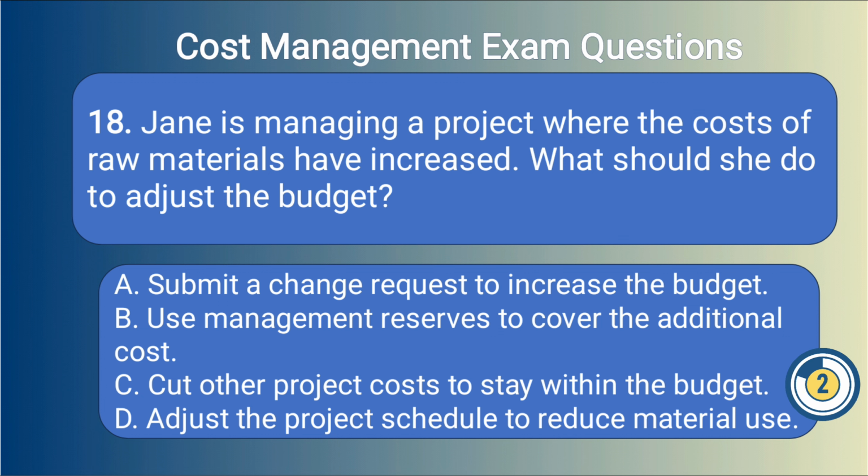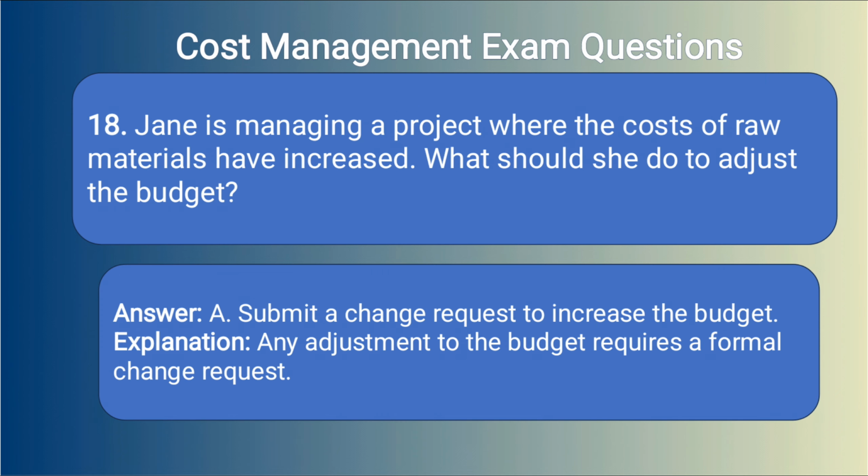Answer: A. Submit a change request to increase the budget. Explanation: Any adjustment to the budget requires a formal change request.